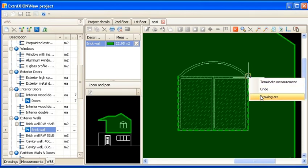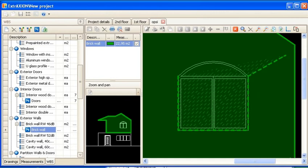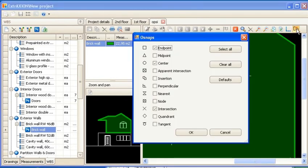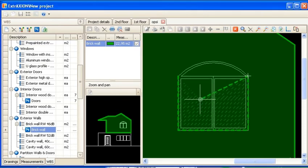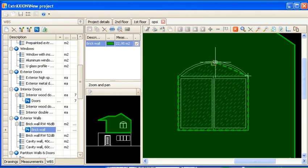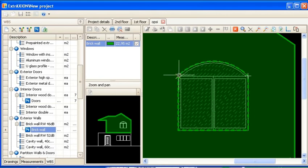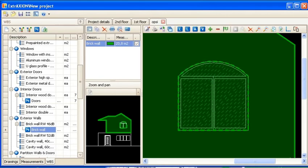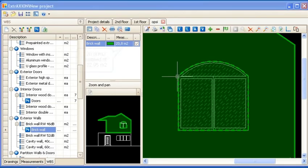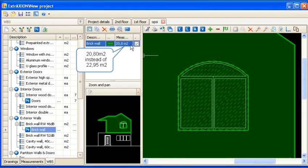This can be done by right clicking and selecting Drawing Arc from the shortcut menu. You can utilize the aid of available snaps when needed. The subtracted opening is marked using a hatch. Notice that the wall area has changed to exclude the subtracted area.